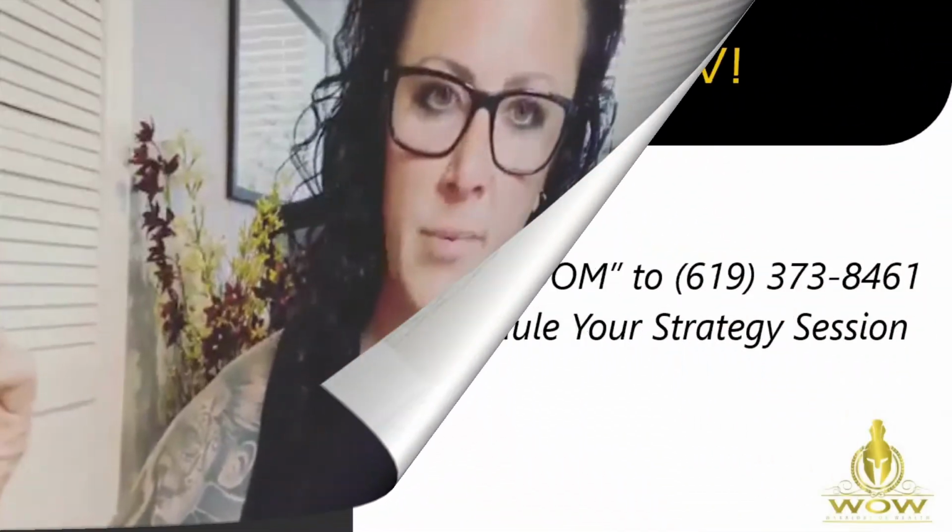We rely heavily on inspectors though, because they know what they're looking for more than realtors do. The realtor can go in and look and say, God, this is not ready to show. It's not rent ready. It's not for sale ready. We'll get a punch list together of things that might not have happened and might need to be polished, fine-tuned, whatever. And then we go through the punch list with the contractor that Sunday. All right, when is this going to get done? And then we just keep that on track until everything is wrapped up.